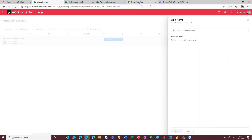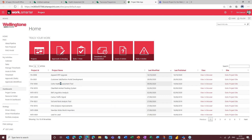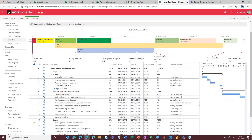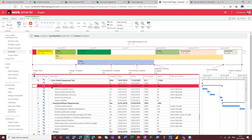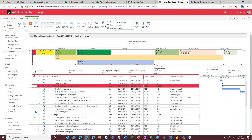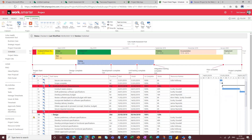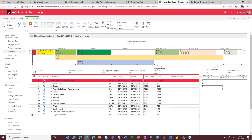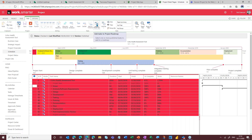You can add items by doing it manually by searching for them here. Or what we can do is head over now to Project Online itself. This is the project that I've linked up so far. I'm going to view it in the browser, and we should now see the schedule loading up. So I can now pick and choose any one of these tasks or milestones to add into that view. I can either do this by selecting items manually — scope is already in place — but I can also go in and add other items as required.